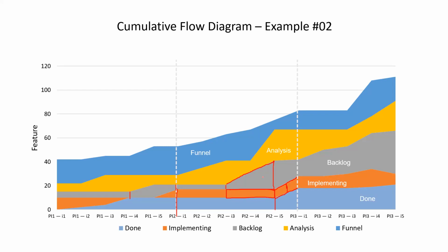Okay, Satish, fine. Typically in a Kanban team, the initial backlog stage and the final stage might not have a WIP limit. And sometimes in between, we might not set WIP limits for some of the stages. It differs from organization to organization or project to project. So if the initial stage and the final stage are not WIP limited, of course, the middle stages are there.